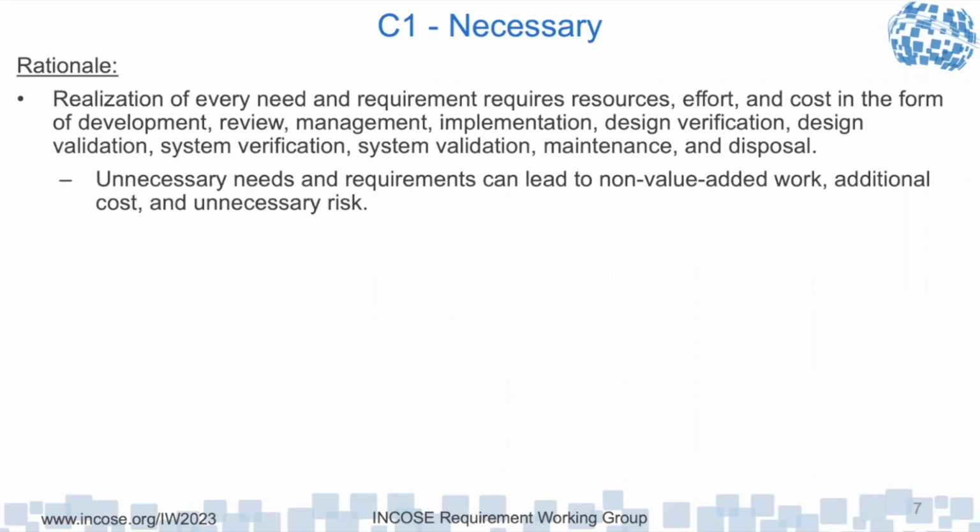What if the objective is in the environment? I've seen that a lot. Another way of communicating that is to use a goal instead of the objective. But I've seen a lot written like: the system shall have a performance of X with an objective of Y. In some cases, when it went out for tender, one contractor bid the X and someone else bid the Y. But then that Y became the shall state, because they committed to it, so now the government is going to hold them to that objective number.